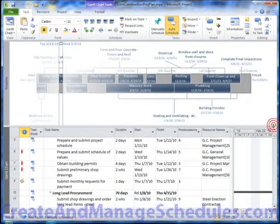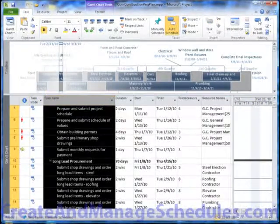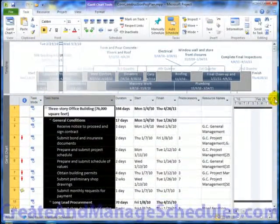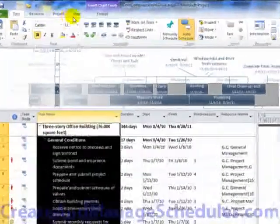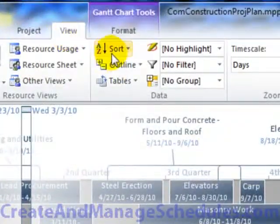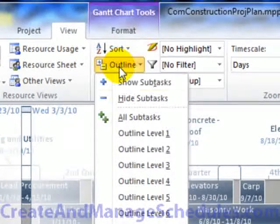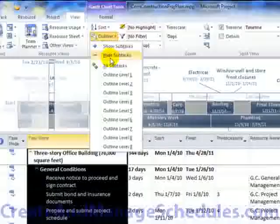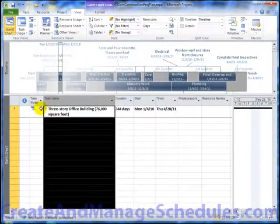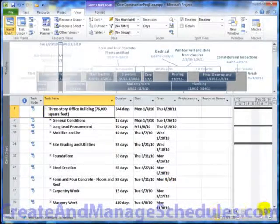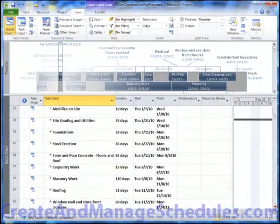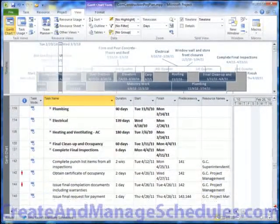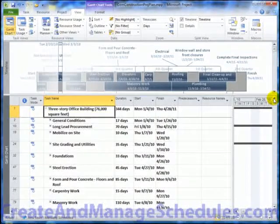The first thing I would do actually is collapse all of these expanded summary items so that I can see the detail below it. And to do that, if I go to the View tab and select under Data Outline and click on Hide Subtasks. And then if I want to expand this one level, I can now easily see how this is organized at one level and work my way through the details just level by level. I find that typically easier.